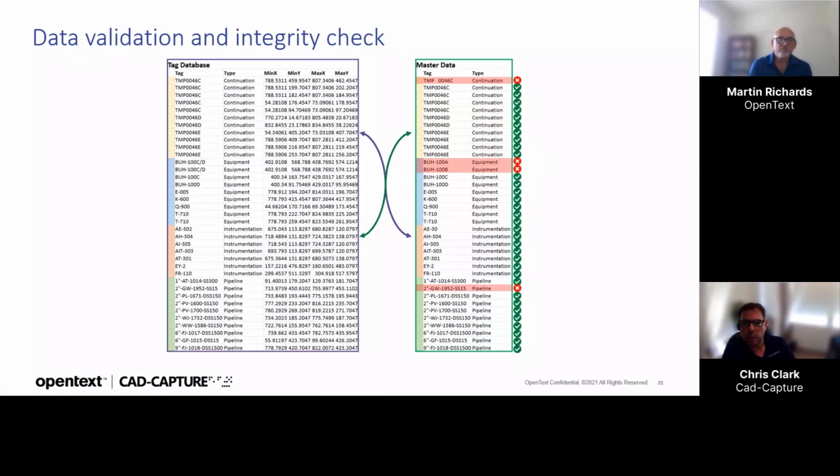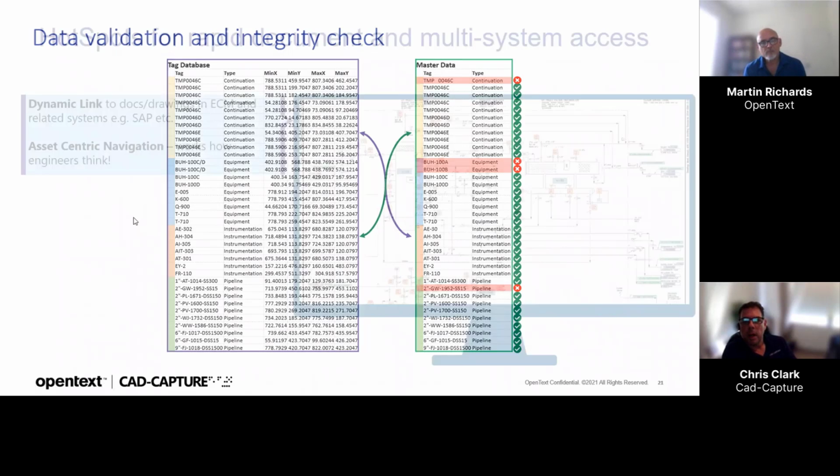So when documents and drawings first come into the organization, you can push back to the partner and say, actually, there's information that's incorrect, there's missing here, and they can be identified and rectified before the drawing gets on the critical path of being project critical. So that means that you can save time and save project delays and cost that generally is created if these problems aren't realized until the drawing's actually in use as part of the project.